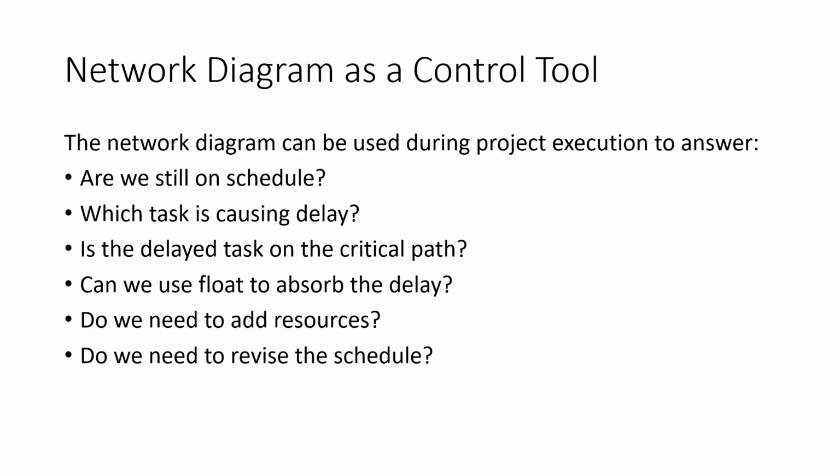For example, if a non-critical activity is delayed but still has float, the project manager may allow it. But if a critical activity is delayed, immediate action is needed. So the network diagram is not only for planning. It is also useful for monitoring, controlling, and decision making.